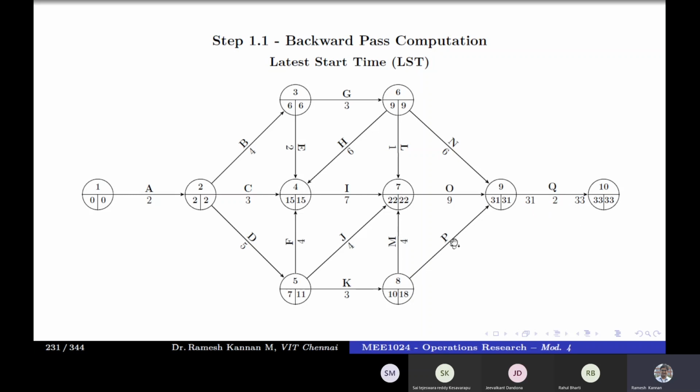Okay. Next will become this activity or this activity. For this activity, the LJ is 31 and the LST of the succeeding activity is also 31. So we'll just simply go for O or P, whatever it might be. So 31, 31 minus 8 is 23. Then we can go for O, 31 minus 9 is 22. Then N is also 31. The reason is that the LST and LJ of this particular thing are the same, so the minimum of that is 31. 31 minus 6 is 25.